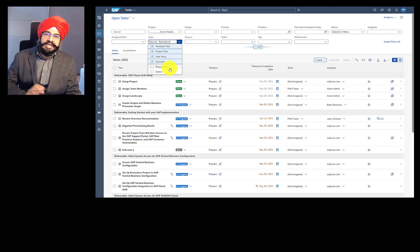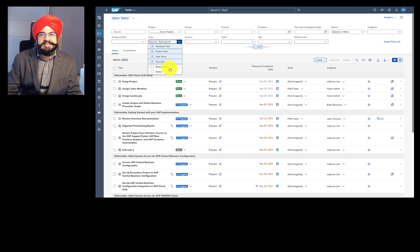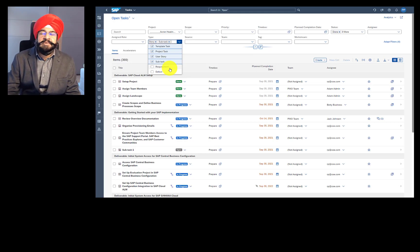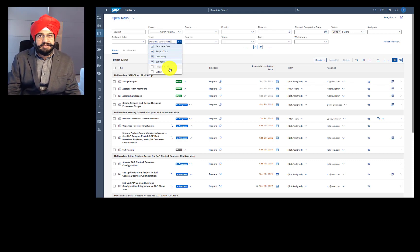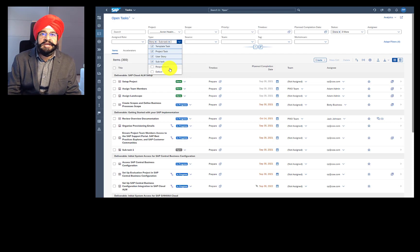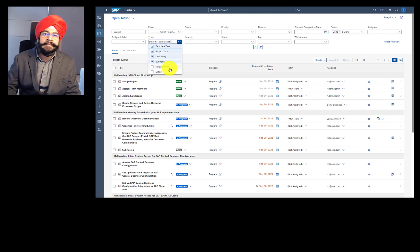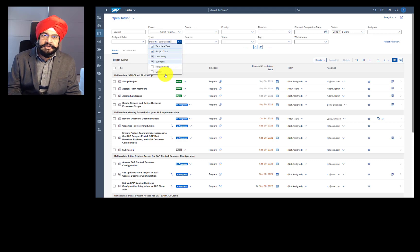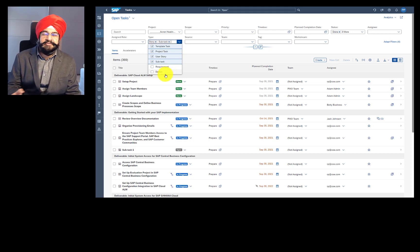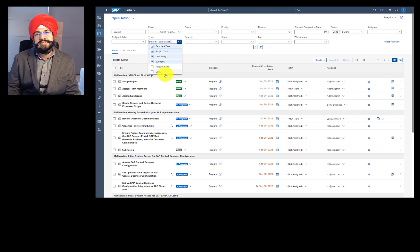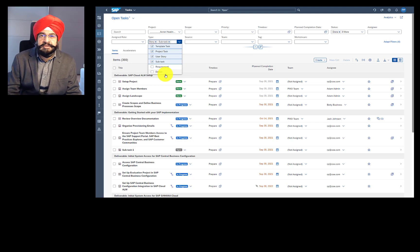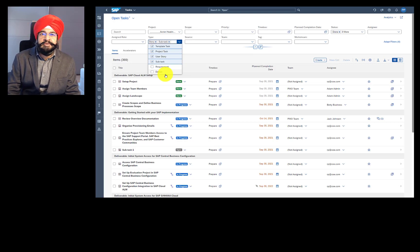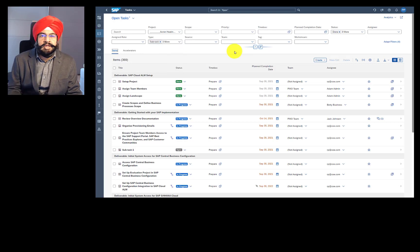Subtask is just a child element of a project task or a user story. Requirement, though technically a task type, has a complete different functional purpose. A requirement is meant mainly for business users. And the requirements also have an approval process built in. Then defect, again, even though it's technically a task type, has a completely different functional purpose, mainly to do with test execution. You raise defects when you encounter issues during your test execution, and you log them into the system.